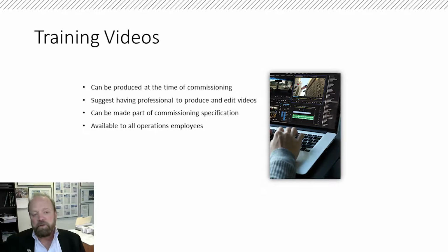Also, as part of the training, we like to provide training videos, and these videos can be produced at the time of commissioning. And I would suggest having a professional produce and edit the videos, although I've actually had videos taken from my iPhone as part of the commissioning process. The videos can be made part of the commissioning specification, and after the videos are completed, they're available to all operations employees.